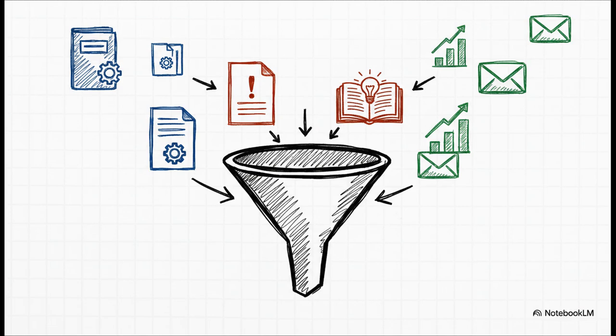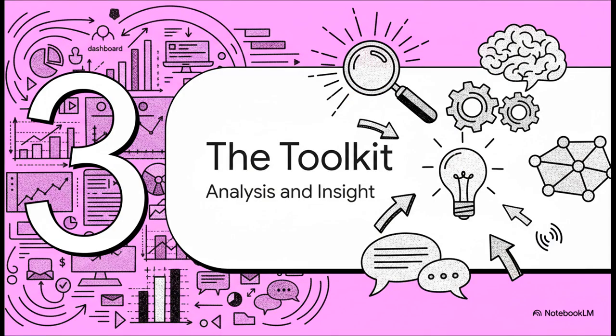Essentially, you're gathering evidence. First, you pull up your plans, your communications and stakeholder engagement plans. That's your blueprint. It's what you intended to do. Then you dig into your project documents. And let me tell you, the issue log is an absolute goldmine here. You might see the same misunderstanding popping up again and again from one department. Well, that's a huge red flag pointing to a communication breakdown. And finally, you get the raw work performance data. How many emails went out, which reports got published. That's your baseline.